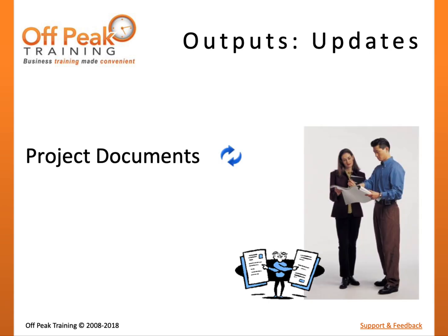Finally, many processes may lead to updates to project documents, such as the risk register or activity attributes. Since project documents are not subject to the same levels of approval that baselines are, these updates will not require formal change control. However, to ensure best practices of proper versioning, access control, and notification, it is important that the configuration management plan is followed.